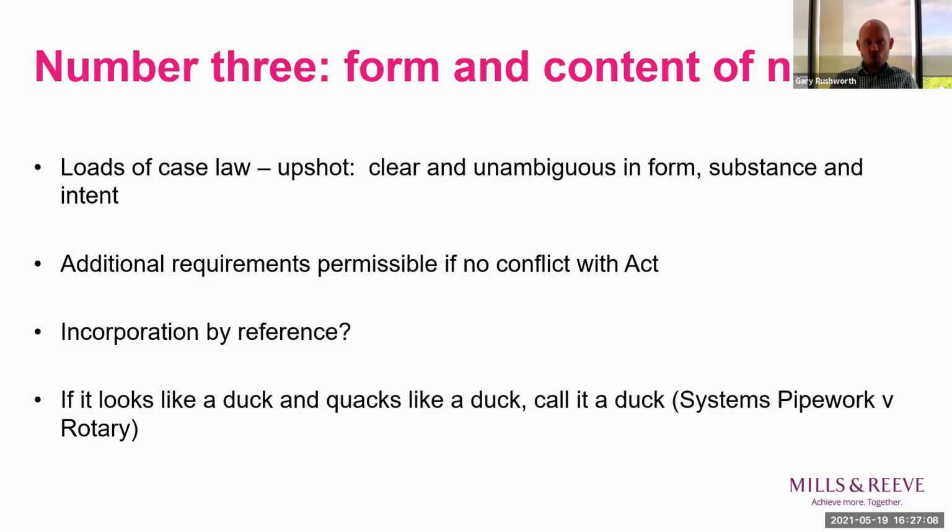It is possible to incorporate documents by reference when you issue a notice or an application. So, for example, you can refer back to a spreadsheet previously issued to the other party. But this is where, ideally, Zoom would have a feature where I could make some big neon flashing warning signs appear, because I think it's a risky approach. If you are doing it, then you've got to make sure you're really clear what document you're referring to. And in my view, it's a much better approach to actually attach the document to the notice, or otherwise send it at the same time so there's no doubt what you're referring to, even if it's a document you've given to the other side 10, 15, 20 times before.